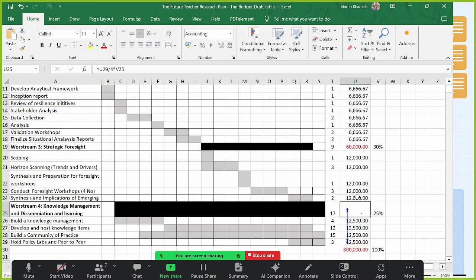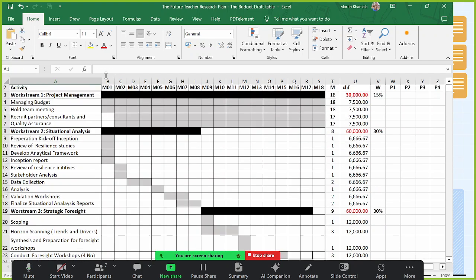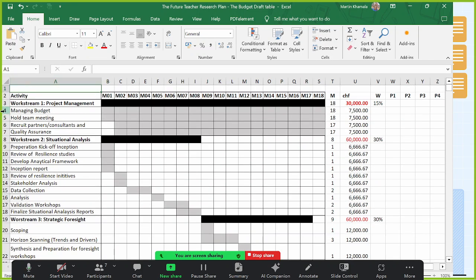If you try to do 800, it will have to go to another administrative process that just makes everything hell again. It has to go to another level. Understand. Should we capture that here, boss? If we say under management, we put here an administrative cost, because there's a fee for the administration of this project that your university will charge. We can add it here, administrative activity.